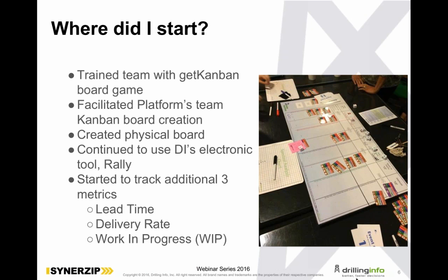Like I stated at the beginning, I started with what they had, and what they were currently doing is where I started. But I would make suggestions and recommendations and let the team decide what they wanted to do. My philosophy is more feature-driven development. I want to create a feature that when it's done, it can be picked up by the customer and start using. I don't want to do half the feature and then not have the customer be able to use it, because there may be a higher priority item come in, and then you have to switch your context and work on that, so you incur some risk.